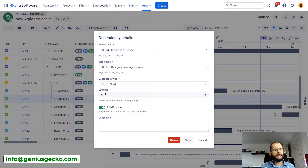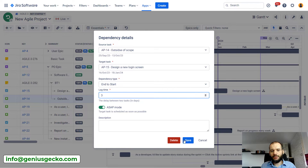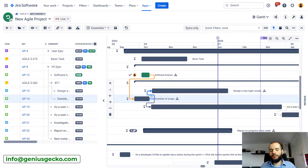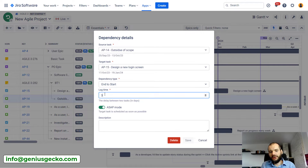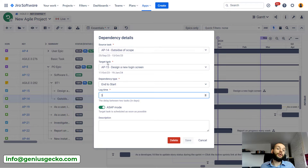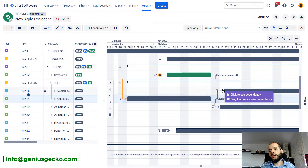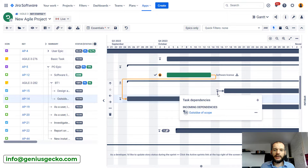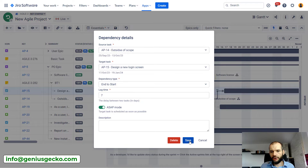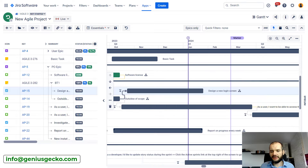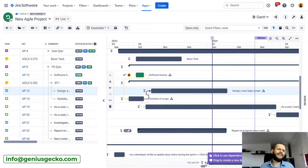You'll also see the lag time and the ASAP mode. The lag time tells us what period of time there should be between those two tasks. If I pick three, for example, you'll see that this task should be moved and three days between these tasks will be available. ASAP mode basically tells that the target task should be started as soon as the source task is finished. You can see there are seven days between those two tasks when we zoom in — two of them fall on the weekend, making it more pronounced.